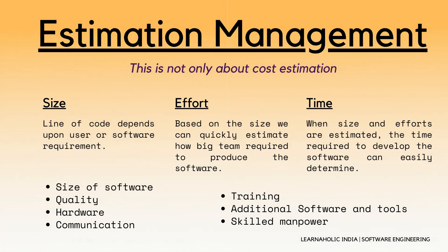The third activity is Estimation Management. This is not only about cost estimation — whenever we start to develop the software we also figure out the size, that is nothing but lines of code, efforts, time, as well as cost. If we talk about size, the lines of code depend upon the user or software requirement. If we talk about efforts, we should know the size of the software because based on the size we can quickly estimate how big a team is required to produce the software.